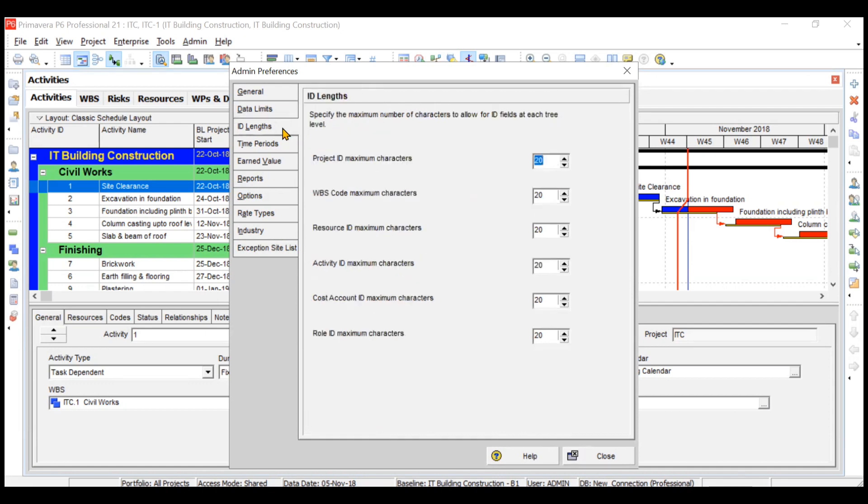ID lengths: when you create some IDs for your activities, for your EPS, for your OBS and all, you can increase the length of your project ID, WBS ID, resource ID also. I think the maximum limit is 45. You can increase these limits also.